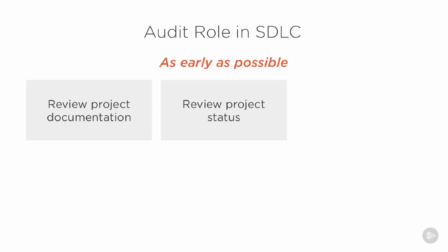We review the project status on a regular basis to see if the project really is on course. In the early stages of the project, there can seem to be tremendously fast developments. But it's in the later stages when we get into the details that things really slow down. And it's at this point often that if we've not been efficient at the beginning, there's no way we're going to be able to meet the timelines when we get into the very detailed work that needs to be done later on in the project.